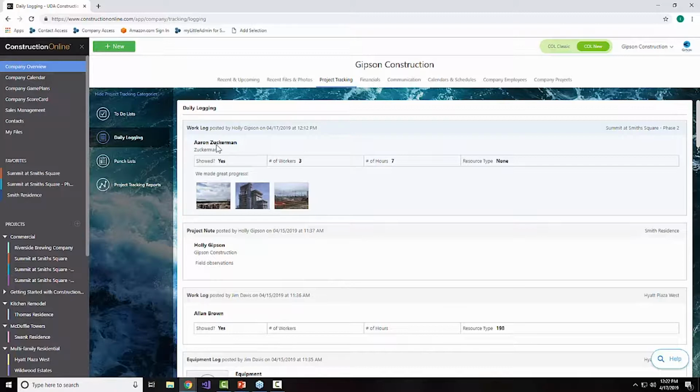This gives us that big picture where we can see everything as it's happening and catch simple things, like maybe the guys are planning on delivering the wrong materials to a job site, or maybe they used one piece of equipment a little too long and that's going to affect the next job that's supposed to have it 2 days from now. Again, it helps us anticipate any potential pitfalls well ahead of time so that we can avoid them as best we can. That's right.